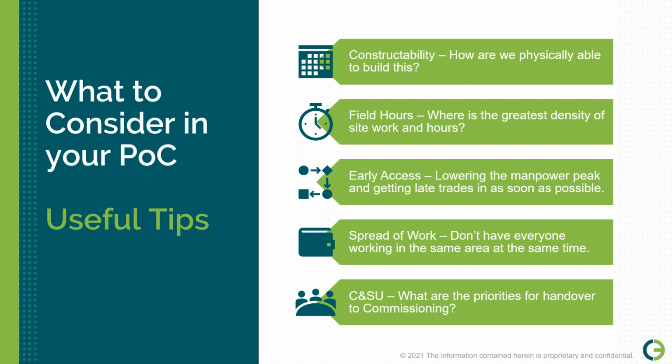By this, I'm talking about something like E&I, electrical contractors. Every project I've done has always had this attitude of, well, we'll bring in the electricians when we need them. And the problem is every project ends up becoming critical path through electrical and instrumentation at the end, because you haven't made the efforts to bring them in soon enough. So rather than myopically focusing on mechanical and then bringing E&I in when we can, try to do what you can to get them a meaningful amount of work early so that you can reduce that manpower peak at the end.